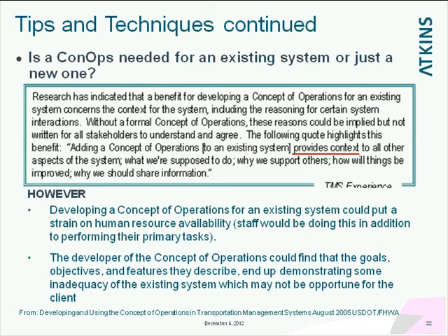But remember, developing a ConOps for an existing system puts a strain on the human resources, and the developer of the ConOps may embarrass the client. You may uncover something that they knew but they didn't want to say. That demonstrates an inadequacy of the existing system, and it may not be opportune for the client to bring that out. So there's some things you've got to be sensitive to.